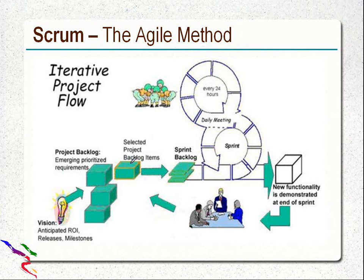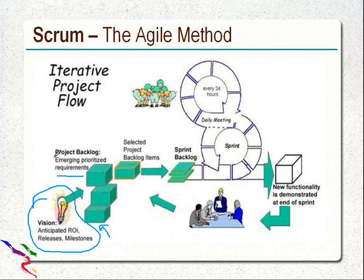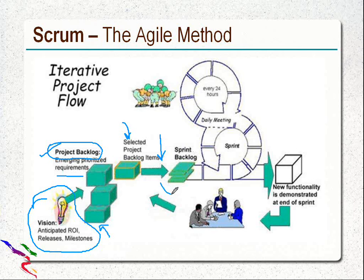Let's have a vectorial representation of working in Scrum. This particular portion shows that it is basically the product owner's responsibility with the stakeholder or the client to put a stack of requirements in a proper priority — that is known as the product backlog. This term will be used quite often: product backlog. Then each of the items is selected from the product backlog for prioritized work — the product backlog items — every two weeks, if our sprint is two weeks. The team selects how much task they can complete in a particular sprint, and that is known as the sprint backlog. All these are artifacts.